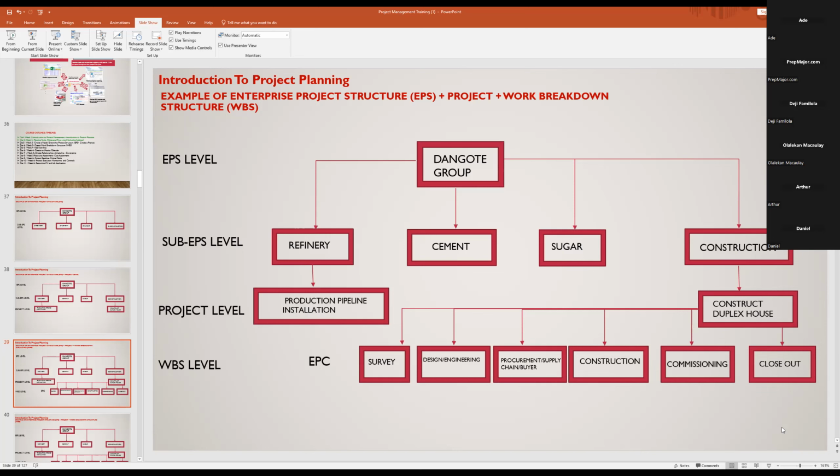A survey is done. You are using a timeline based on what they've set and what they said they will achieve at a particular time. You are getting that information to benchmark what they said they would do at the time they said they would do it. Are they doing it? If they're not doing it, what is the impact?